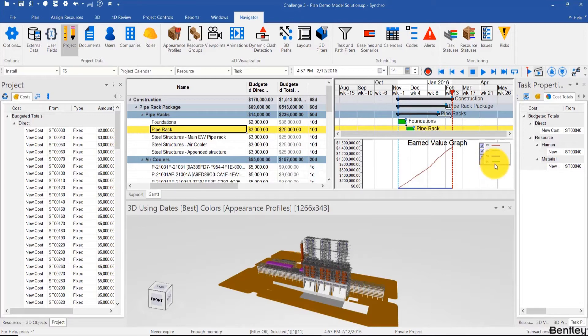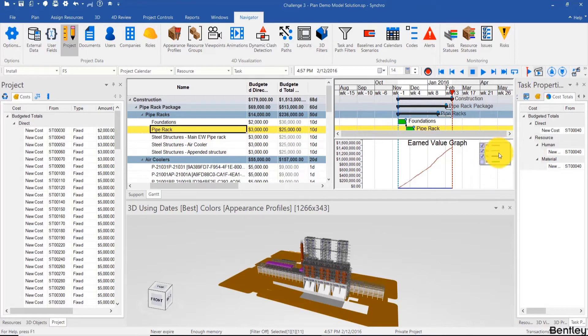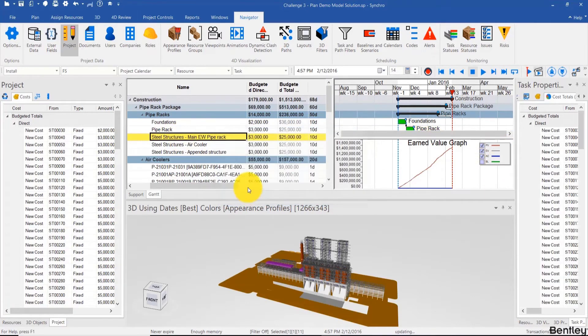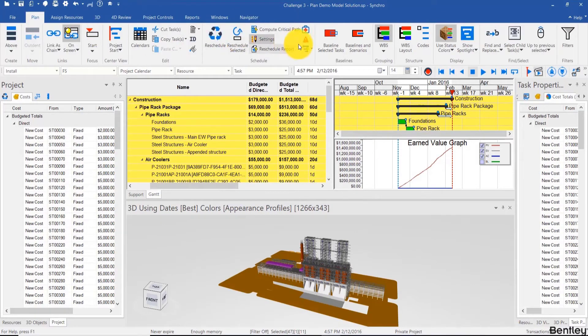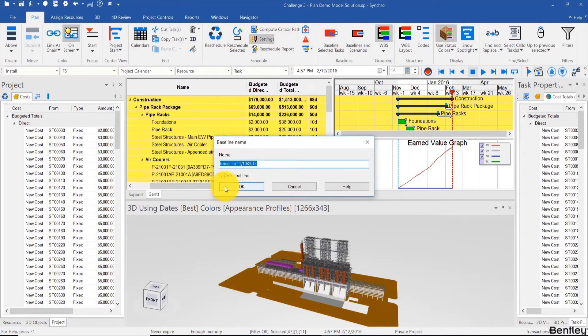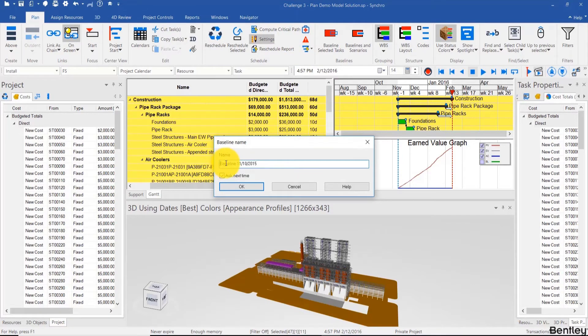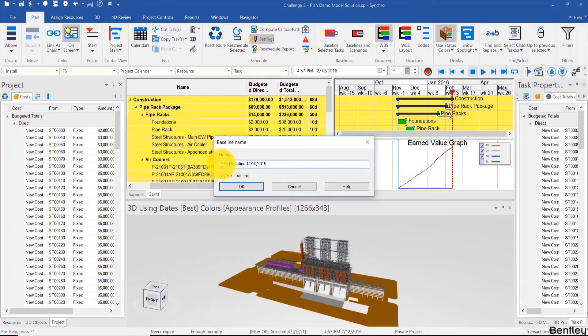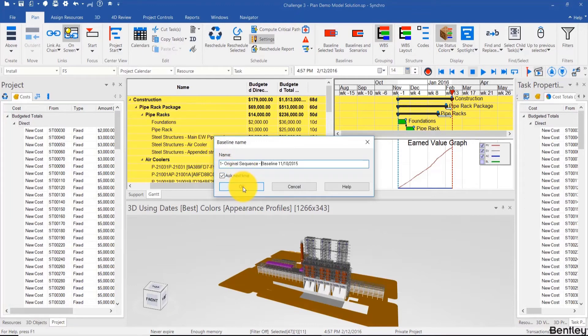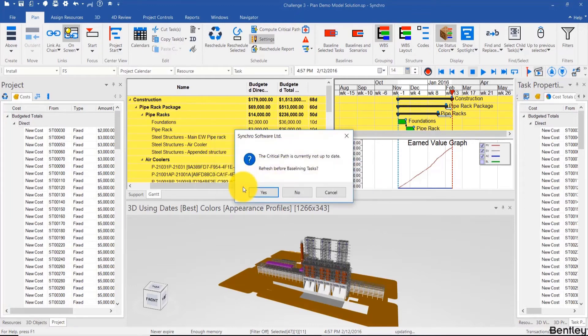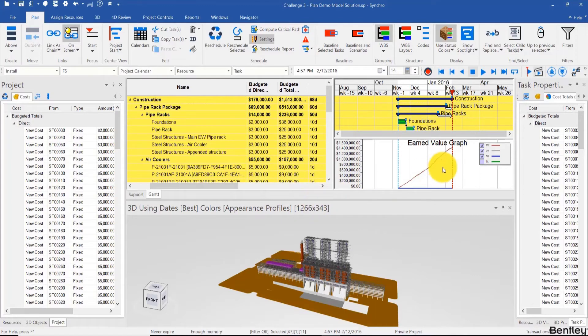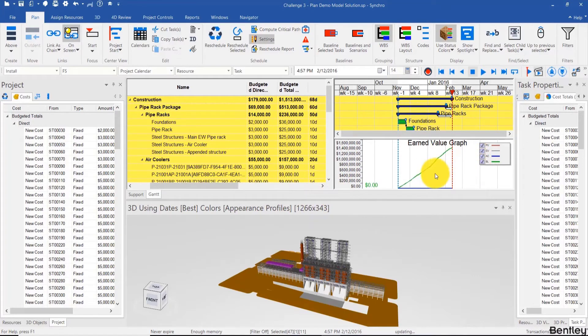And then baseline cost is to evaluate multiple baselines or scenarios. So let's look at earned value and baseline cost. To have a baseline, I'm first going to select all tasks and simply go to Plan and Baseline Selected Tasks. And you can change the name. I usually change to describe the baseline name over here, for example, say original sequence, and I keep the data date in the name just so that I have it.